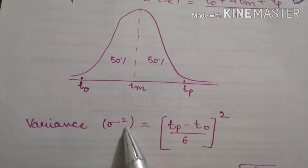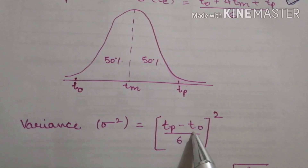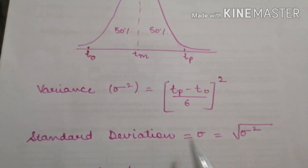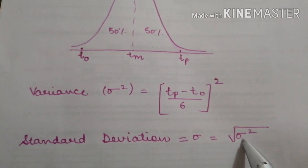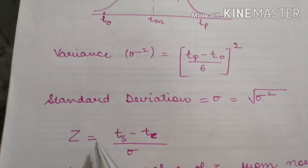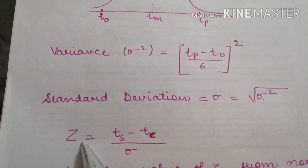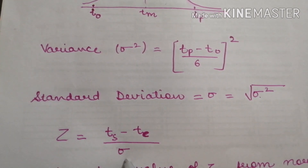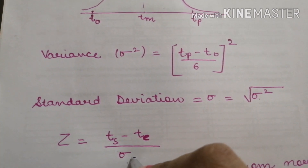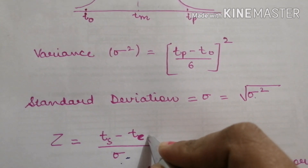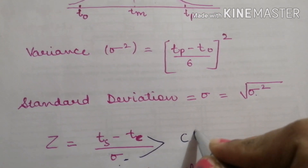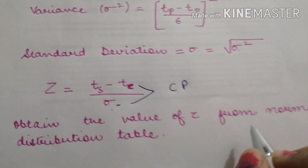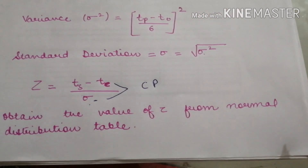We denote variance by sigma squared, and the formula is (Tp minus T0) divided by 6, whole squared. Standard deviation is the square root of variance. The formula for calculating the probability is Z equals scheduled time period minus expected time period, divided by sigma. This sigma and Te will be for the critical path — we consider critical path values, then obtain the Z value from the normal distribution table.